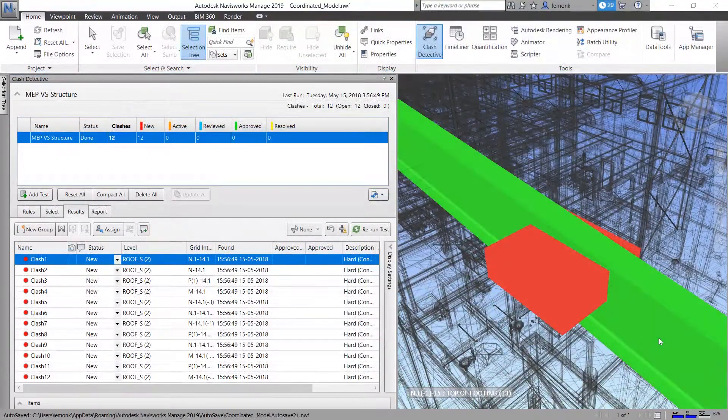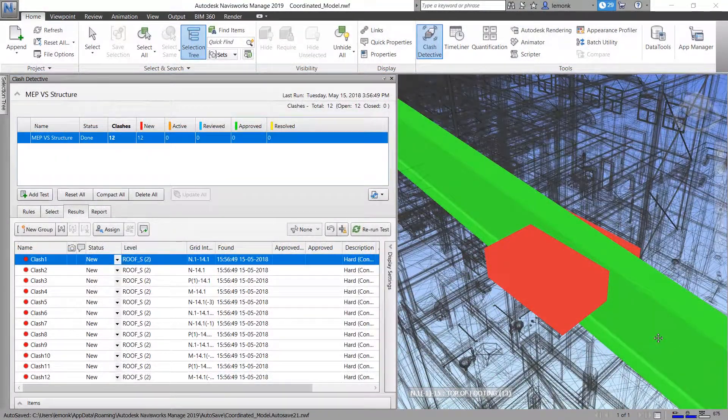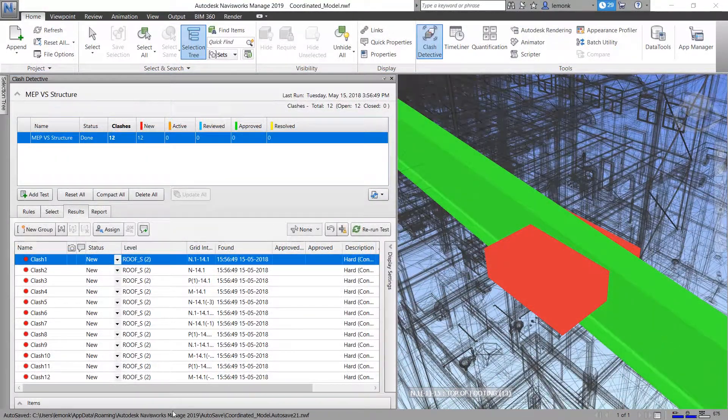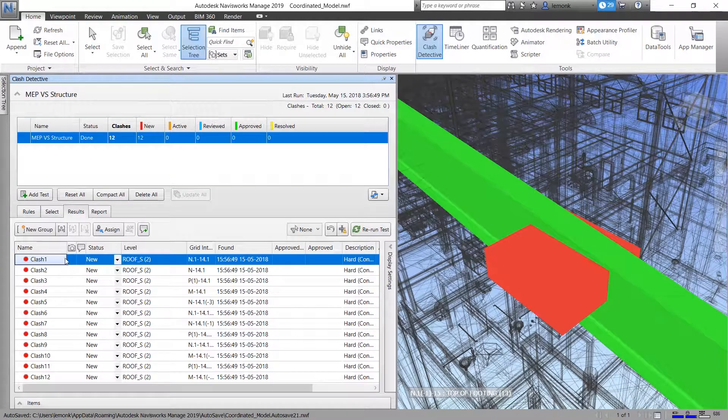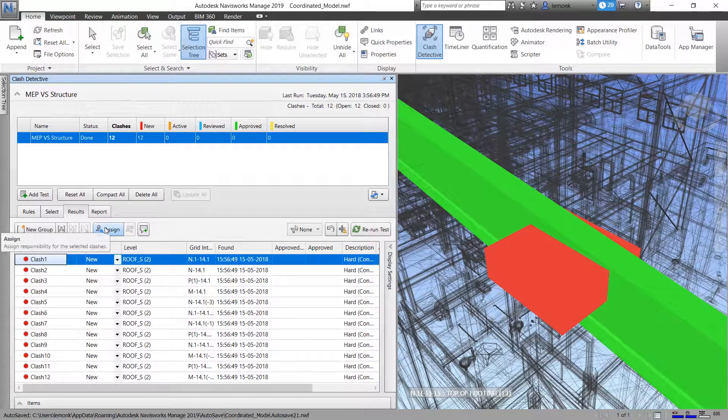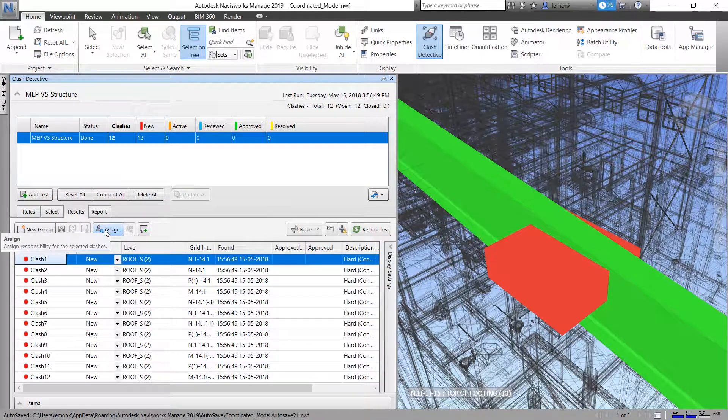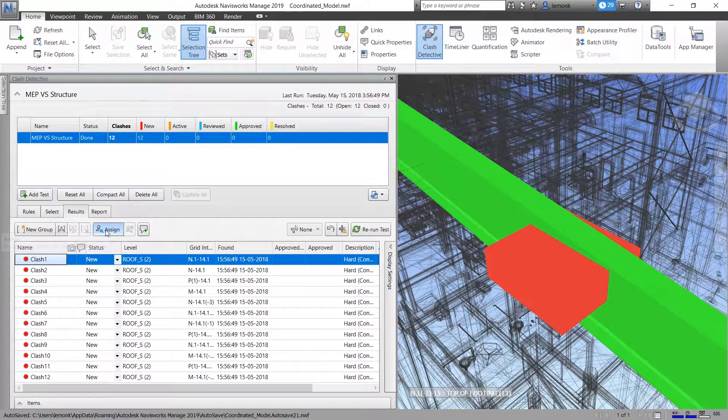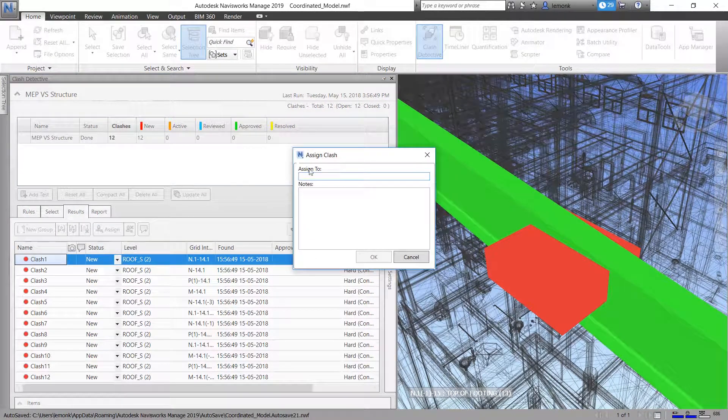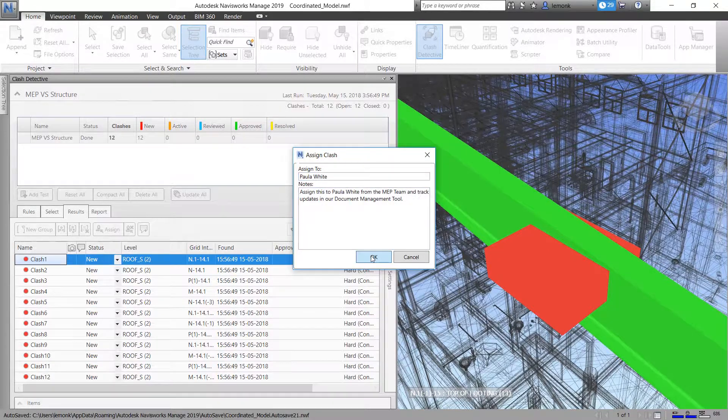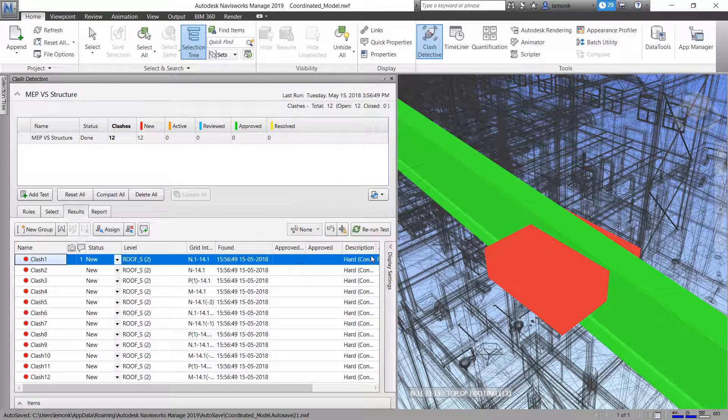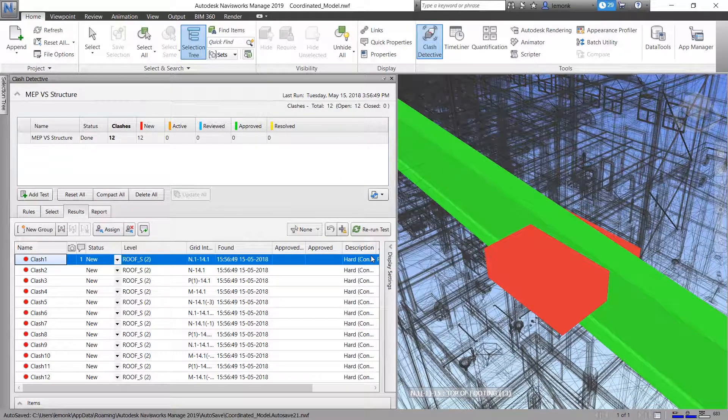As each clash is examined in more detail, the structural team informs the local project manager that the light fixture placements in the electrical model need to be adjusted by the MEP team to resolve the clashes.